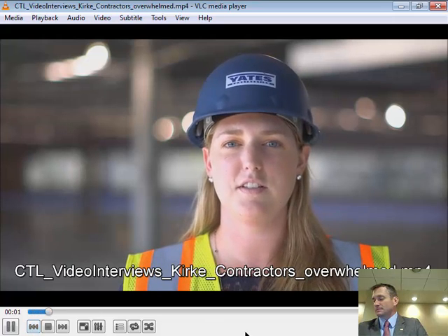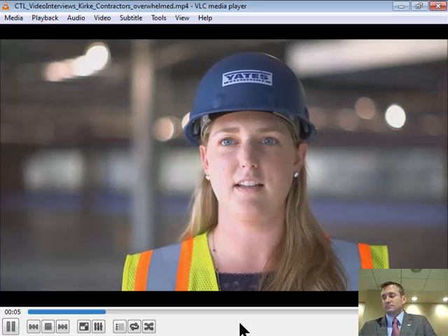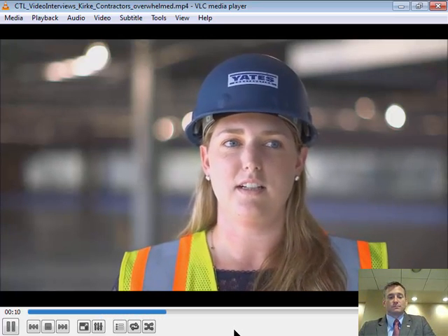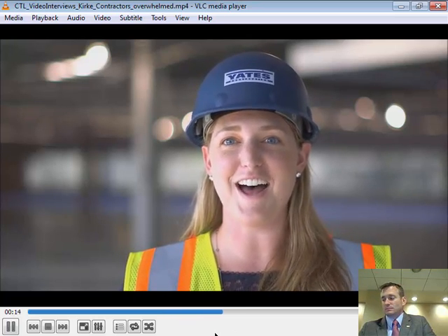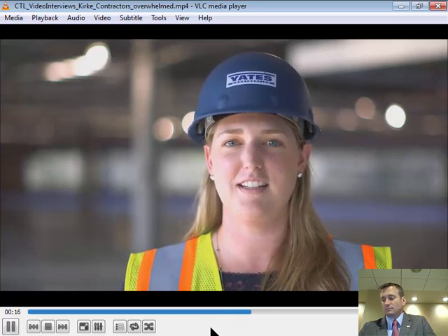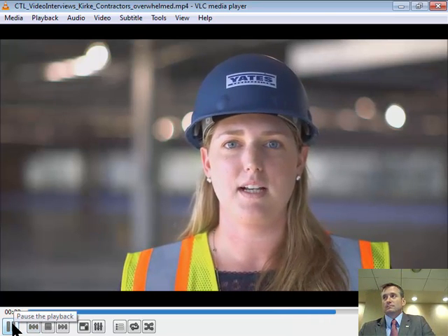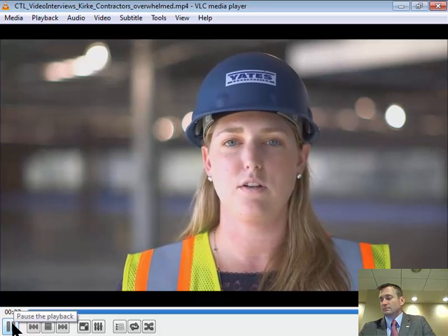A lot of the subcontractors were very overwhelmed when they look at their shop drawings and say, I have to create this virtually. They're like, how do you go from here to building it in a model? So for instance, conduit, they think, oh wow, that's a lot of modeling, a lot of small pieces. And so you just have to kind of help them navigate that process so it's less overwhelming and look at it in small pieces instead of the overall picture. So go phase by phase.